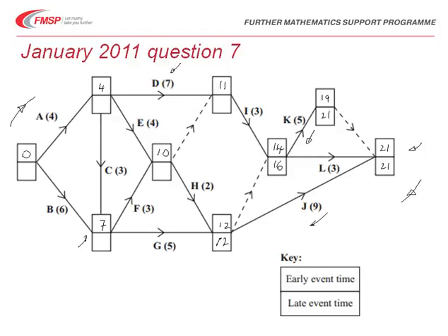Going up the top of the diagram, 16 take away 3 is 13. Then looking at this one in the middle, two different routes to that: 13 with the dummy, or 12 take away 2 is a value of 10. At the bottom event, 12 take away 5 is 7, and 10 take away 3 is 7 as well. And then up to the top, 7 take away 3 is the smallest one there, which is 4, and finally 0 at the end.